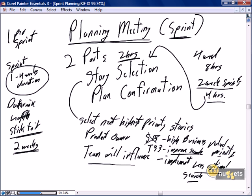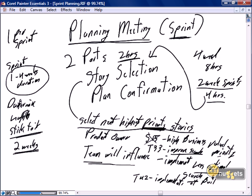We'll talk more about technology debt later in the series. The sprint planning meeting is where we select the next highest priority stories, where the priority may be business priority or the project team's priority to remove technology debt, improve process, or implement technology. For example, team story 42 might be the implementation of a new build server. The implementation of new technology into the project environment also becomes a story selected as part of the sprint planning meeting.